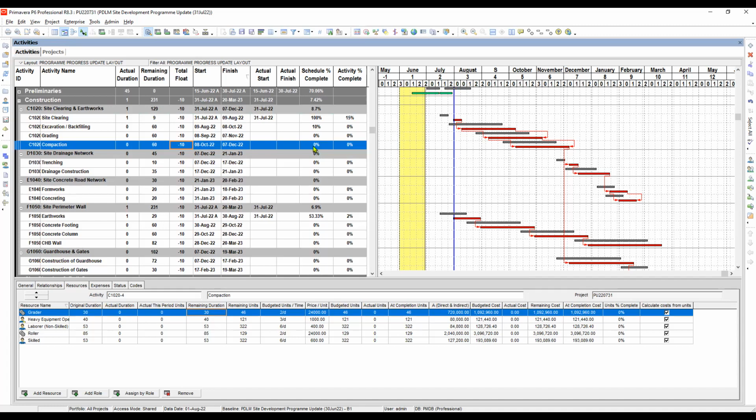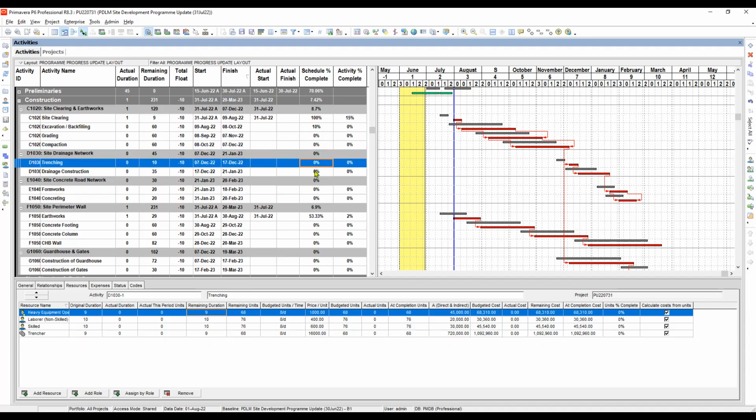Okay, so I think it's good to run the store period performance. But before storing period performance, be sure that everything in the program update is accurately and completely done, because this is the last process of updating the program.